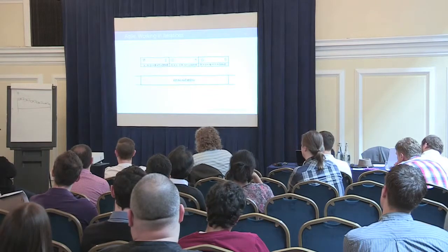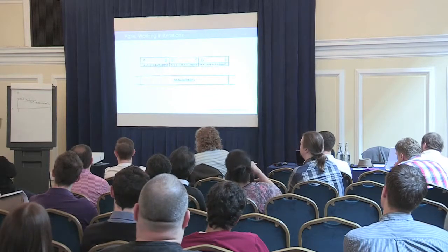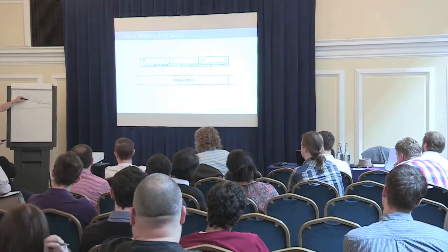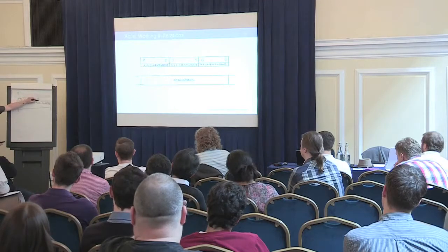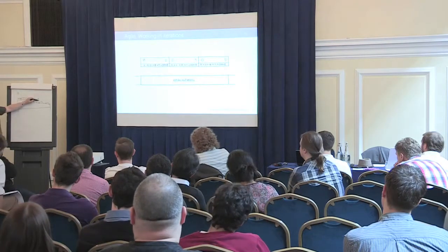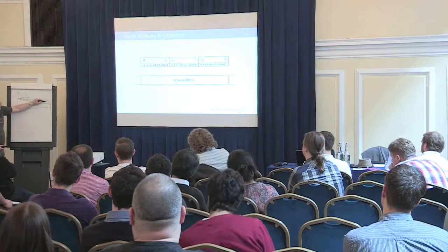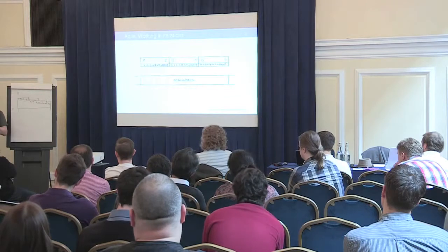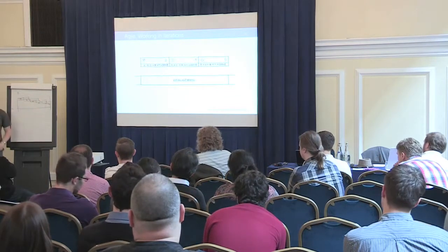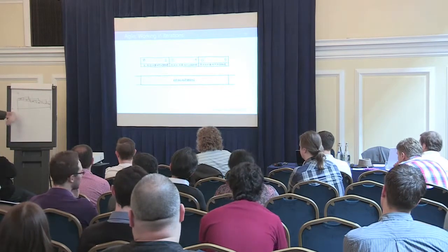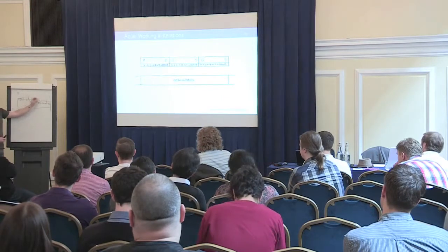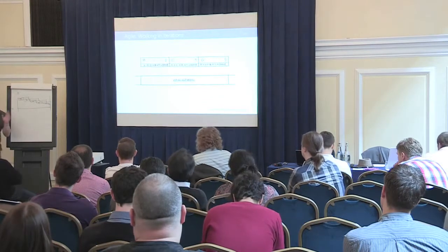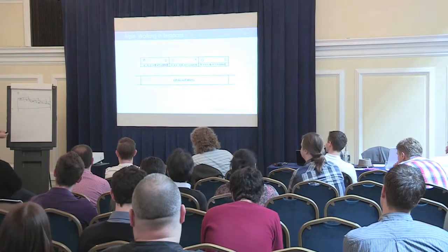Which means even if you work hard, your requirements take longer to investigate. This is what will happen. So this takes longer. Well, this will move, and it probably also takes longer. And then after analysis, we do design. So design also takes a bit longer. And then we start building this stuff. Oh, and then we're at the end of the sprint. As a result, I probably have some nice design documents, maybe some use cases totally written out or whatever, but I haven't got a single line of working code. So this is a risk that a lot of starting teams are dealing with in Agile.